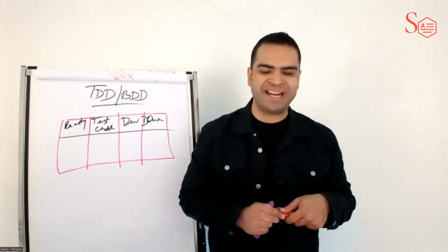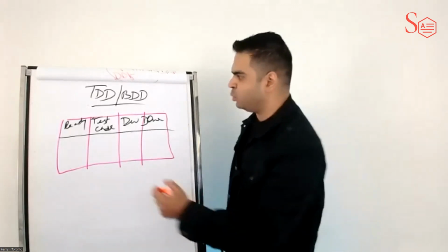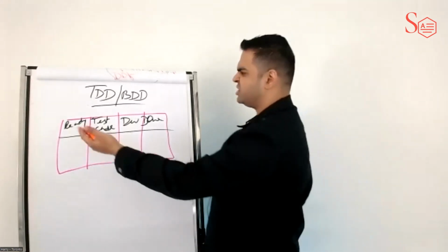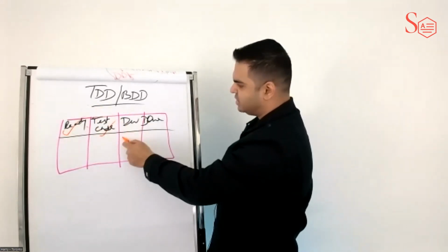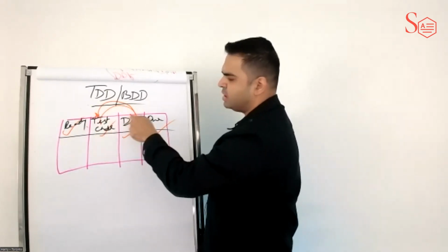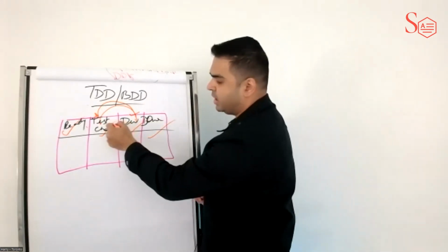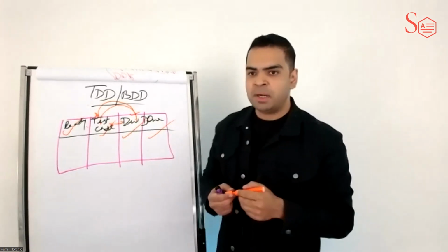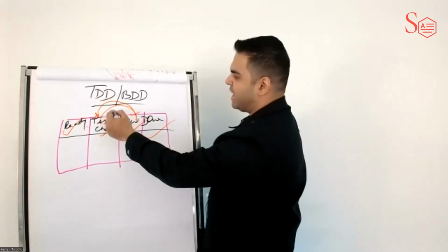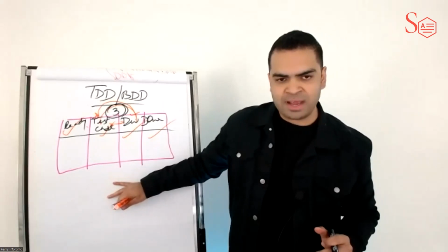Spot on, spot on. So the idea behind WIP is that we put a limit on the maximum number of items that we can have in any stage of our Kanban board. So here's a simple Kanban that I've drawn: ready, test cases, develop, done. Or in some of our traditionally working teams, you could have developed first and then they write test cases. If a team is doing true test-driven development, they might even consolidate both of these into one column. But the main idea here is this, that we put a limit on the maximum number of items that we have in progress at any given time in any of these columns of the Kanban.